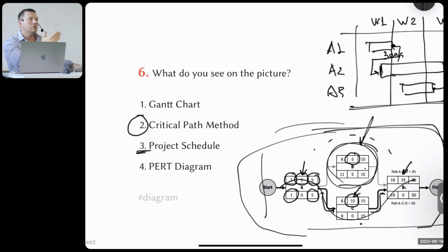But every time we change it, we say the baseline was 75 days. Now the new suggestion is 79 days. So the difference from the baseline is plus 4 days. Do we accept it? Everybody says, yes, we accept it. Okay, we do it. That's the idea. But we always have a baseline. So the project manager must have a baseline. And the baseline must be signed by the customer. Well, ideally by all the key stakeholders.